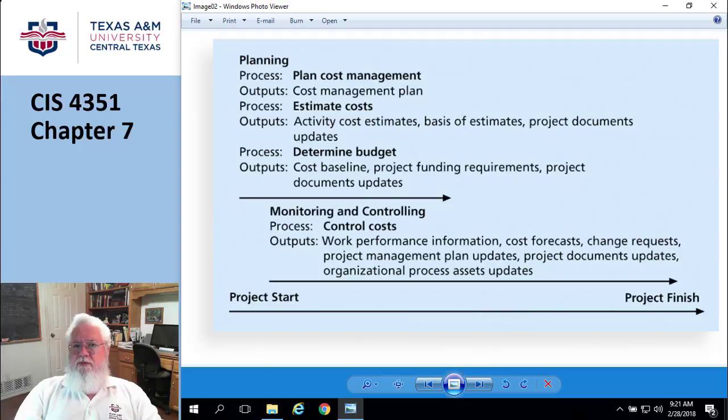If you decided to go or no go, you're not getting the sunk cost back either way. So you cannot use sunk costs as a justification. Okay? I know that's not human nature, and you finance people are going, yeah, we already heard all this before. And it's a fight against human nature.